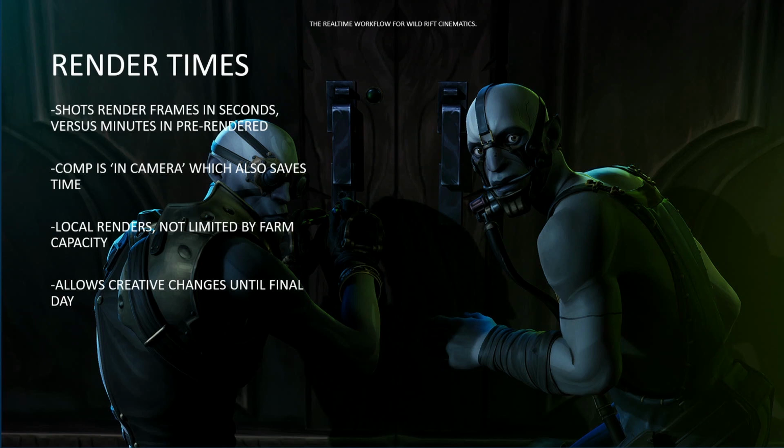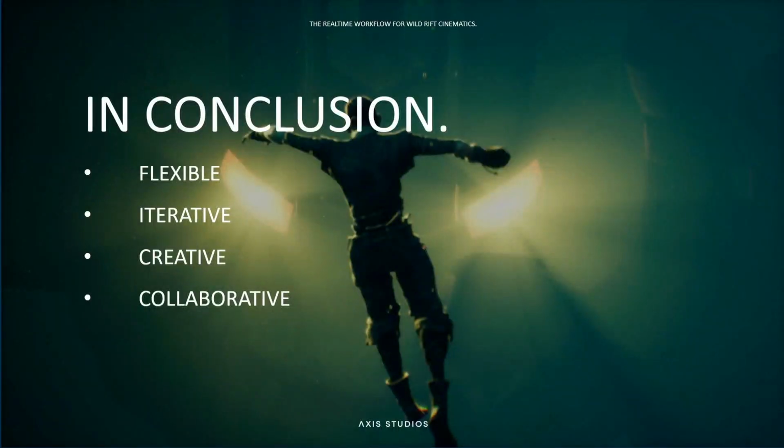Generally, on a pre-rendered show, you do not want to do that. You try and lock things off in the last week. The last week is just final touches. You do not want to be messing with things. But for us, because it was a matter of minutes, seconds, sure, we can change this light. Why not? So to try and summarize everything I've just talked about, how did real-time change our approach?